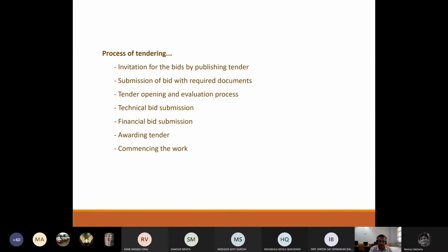You had earlier done a projection of the finances. If your estimated budget as the architect and the estimated budget of the contractor match, then you know that you're working with the right kind of person who thinks similarly to you, that a project of this area should cost so much. Don't forget, usually cost of projects depend upon the area of the project and the kind of specifications you want to use for the project, and the kind of material you want to use for the project.